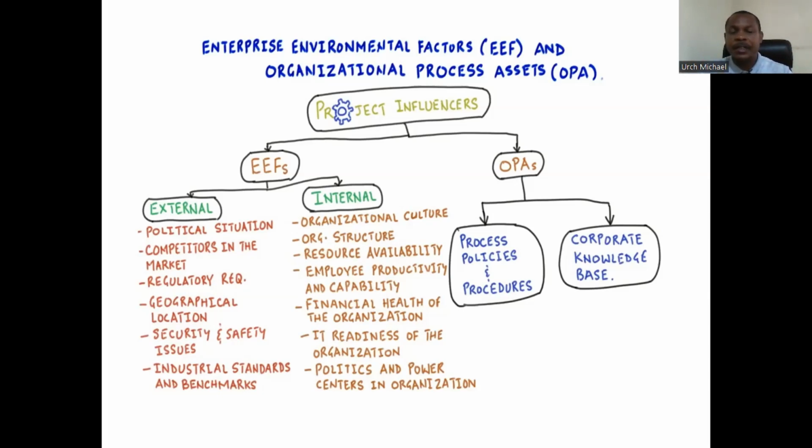For the EEF, this diagram breaks it down into external and internal. Then the OPAs, you have the processes, policies, and procedures, and the corporate knowledge base. So for the enterprise environmental factors, the external EEFs will have the political situation. You have to look at the political terrain of your project environment, and also competitors in the market. You have to consider that these are external.